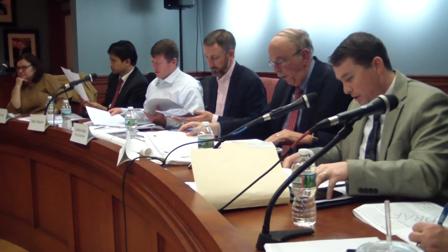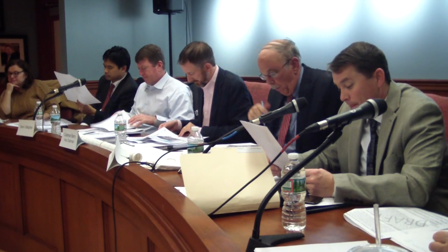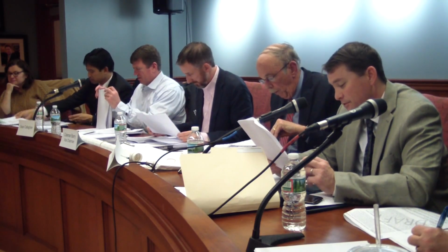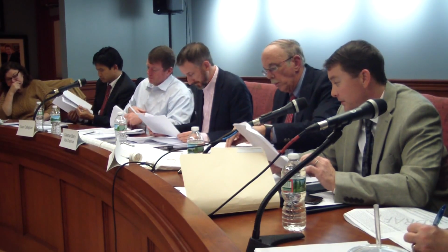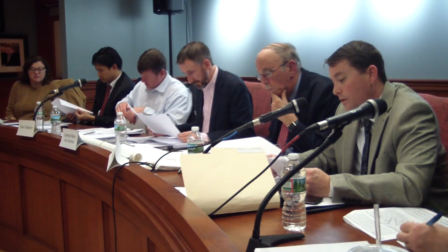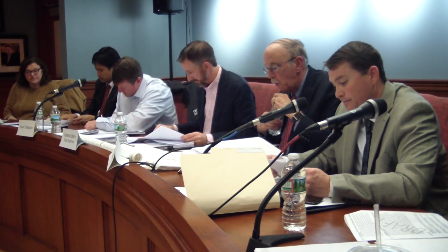Department, Mr. Stevens. Good evening, Mr. Chairman. The department is prepared to offer a recommendation on this project. And we have a number of conditions I'd like to read into the record. First condition, if the board chooses to approve this, would be the applicant shall submit a construction management plan to the Inspectional Services Department at the time a demolition permit and building permit application is filed. Number 2, the stormwater operation and maintenance plan shall be recorded at the Norfolk County Registry of Deeds. Number 3, the applicant shall apply for a stormwater connection permit from the Department of Public Works before construction.